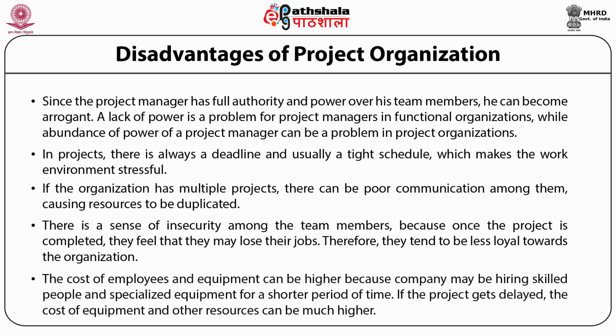The cost of employees and equipment can be higher because the company may be hiring skilled people and specialized equipment for a shorter period of time. If the project gets delayed, the cost of equipment and other resources can be much higher.